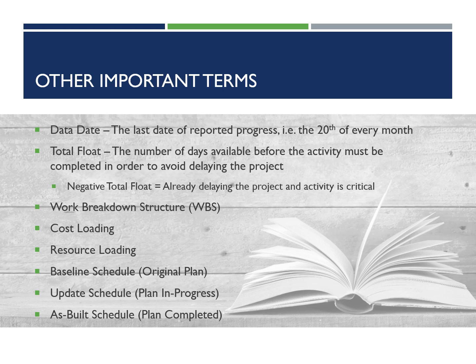Let's pretend that it's 30% complete. When we go through that billing cycle, the electrician, or the prime, would be compensated for 30% of the overall value of that activity. If it's a $1,000 activity and it's 30% complete, we're talking $300.